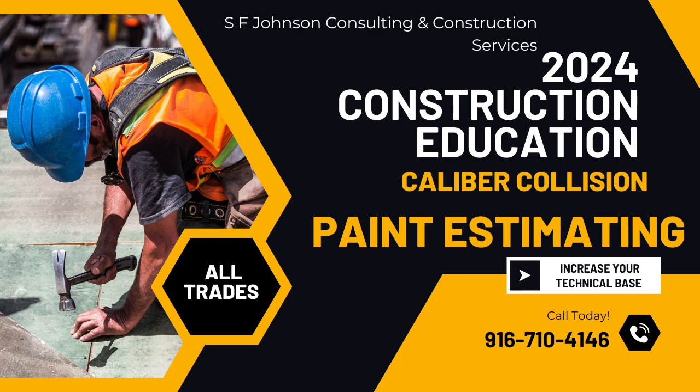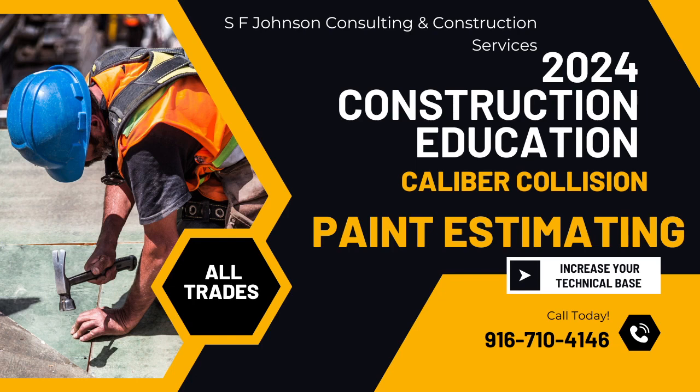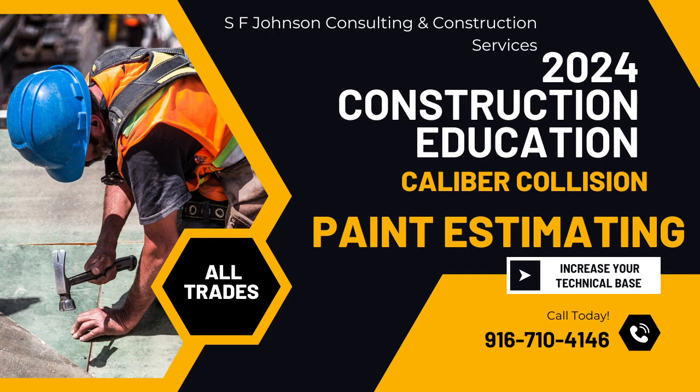When we produce our painting estimates, we break it down in two areas. The first area is all of the labor. The second is all of the material involved. And so the only way to determine the labor is to have an accurate source for which you know how long it takes to paint a square foot of wall, of ceiling, of trim. And so that's what we're going over right now.